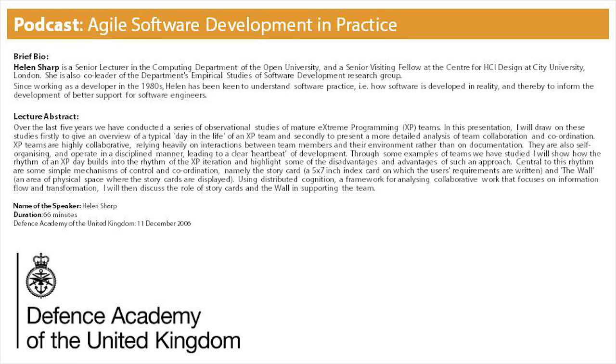And then once the card was finished with, so the story had been implemented and tested, it had a red tick put on it. This is what I mean by discipline. Right? Everybody did it this way. And it's quite important because you can see at a glance what state a story card is in at any one point. So that's the card.